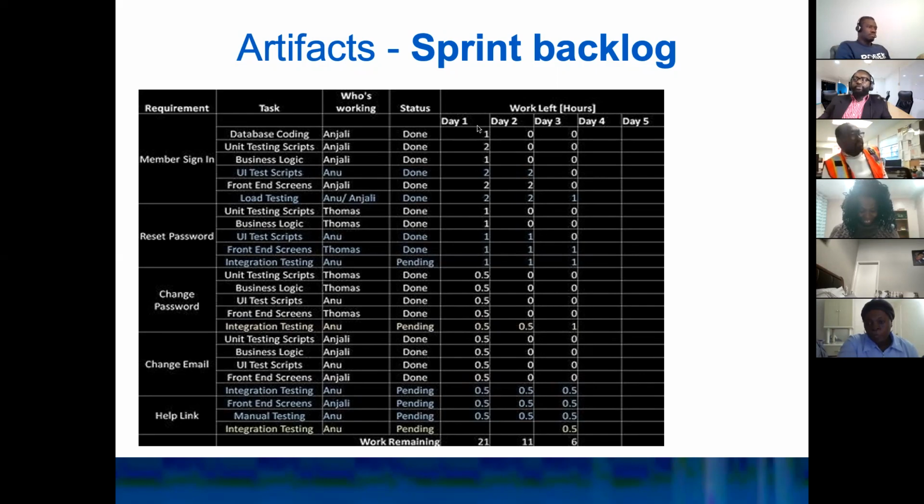And every day we're tracking the progress of those tasks, right? And whenever we complete those, we're moving the tasks from in progress or pending to done. In this case, it's pending, from pending to done, right? Now, once you complete a story, and I was telling you, if it's a 5-point story, then you just took 5 points off of your total number of points for the sprint. And your burn down chart is going to move 5 story points down.